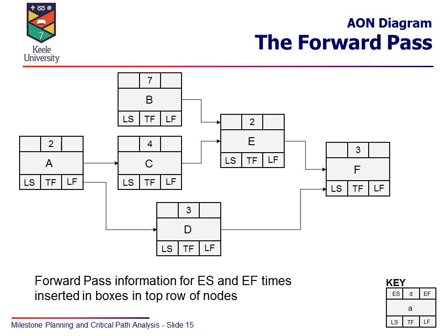So the diagram looks like this, and you can see that activities A and B can start straight away, have no predecessors. Activities C and D can only start when A is complete. Activity E can only commence when B and C are complete, and activity F can only start once activities E and D are completed. So the precedence table has given us that information.